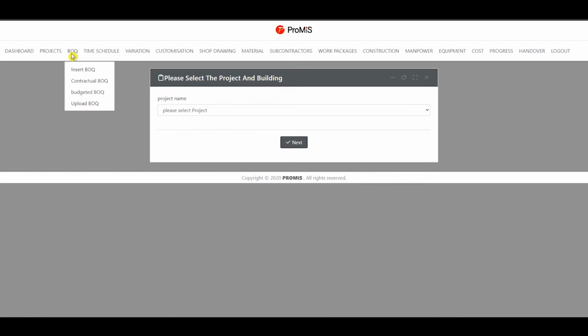This is the second training video in which we will talk about using the BOQ chapter from Promise's main menu. It is necessary to mention that there is a sequential method of data entry you must follow. First would be BOQ, then time schedule, variation orders if any, and finally customization. These are all fundamental data for Promise, as all other processes depend on the data of these four chapters.